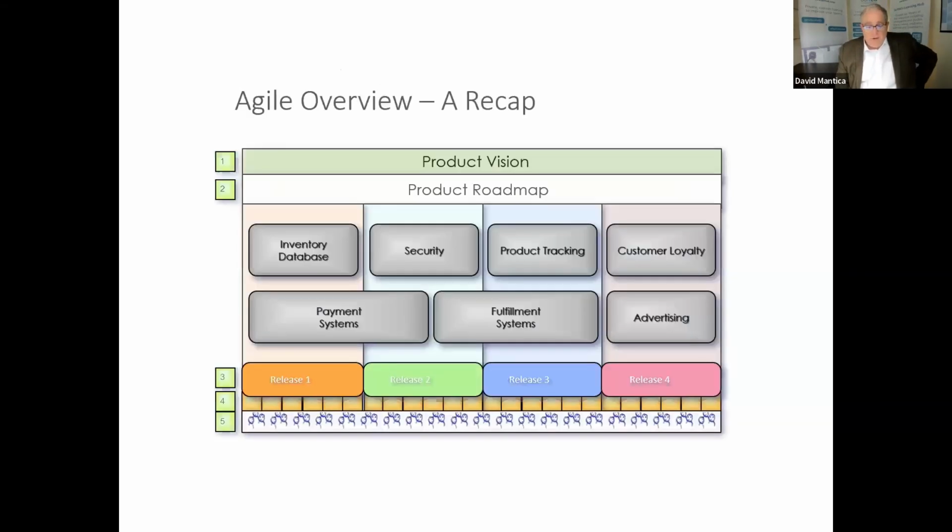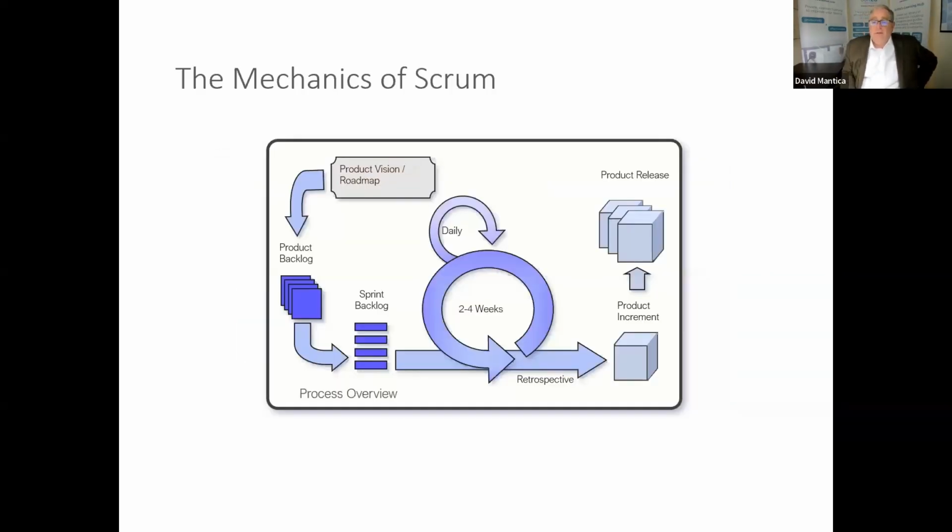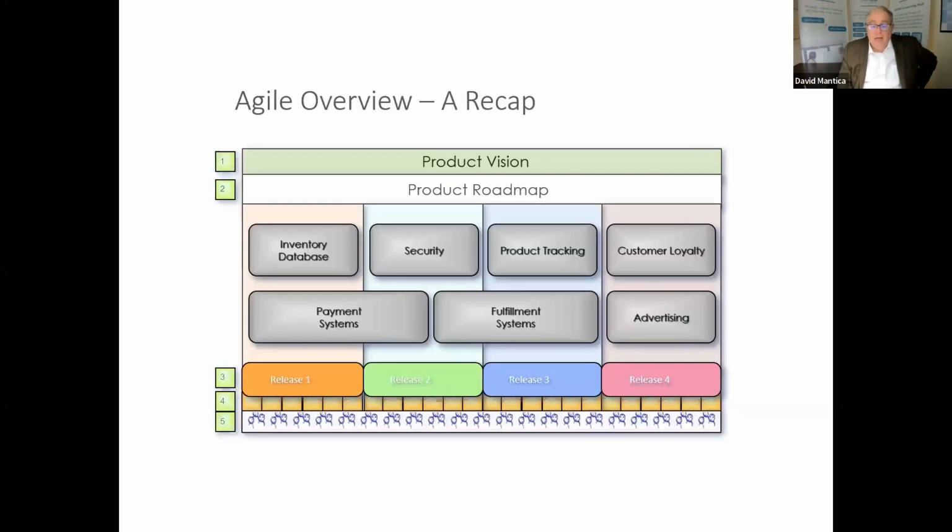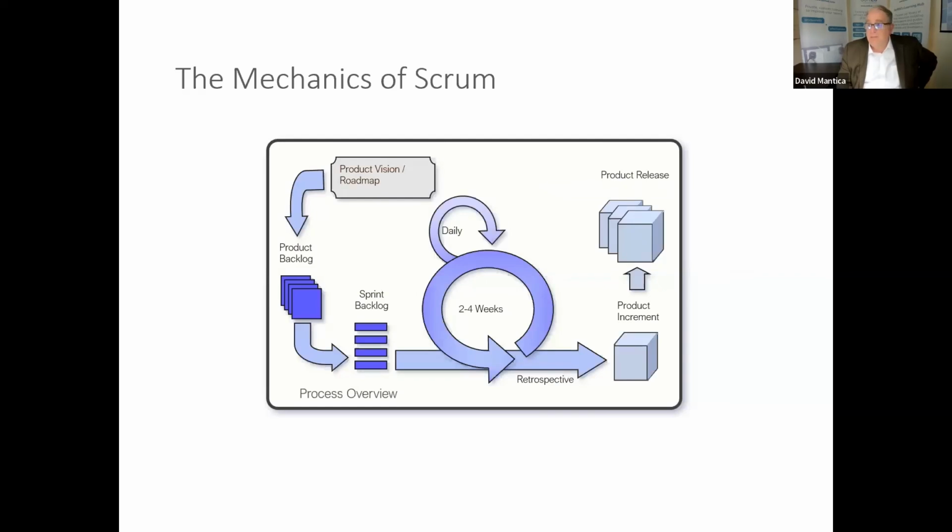So inside number 4 is your Scrum model. Ultimately, you're going to have a bunch of 3s as a product backlog, a bunch of release ideas. Here's all the different things we should be doing. And then they're going to be broken down into user stories, tons and tons of user stories based on the functions. And business analysts, Sonia, will be involved in creation of those user stories so that you can create a backlog. Then you're going to be looking at that backlog and deciding your sprint backlog.